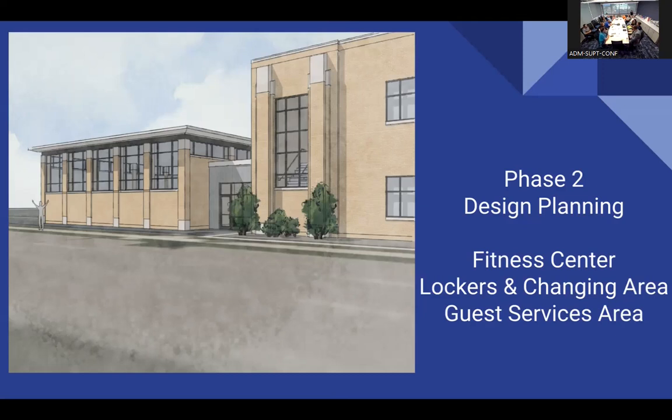And wasn't anything that could be recycled factored into a subcontractor's bid? For the building that's coming down, yes. What Shelley's referring to is demo contractors. The copper, the steel, anything that can be recycled that has value becomes their material, so that comes into their overall number.